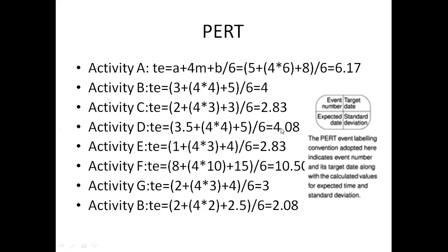Here, in this PERT, the event labeling convention adopted here indicates the event number and its target date along with the calculated values for expected time and standard deviation.